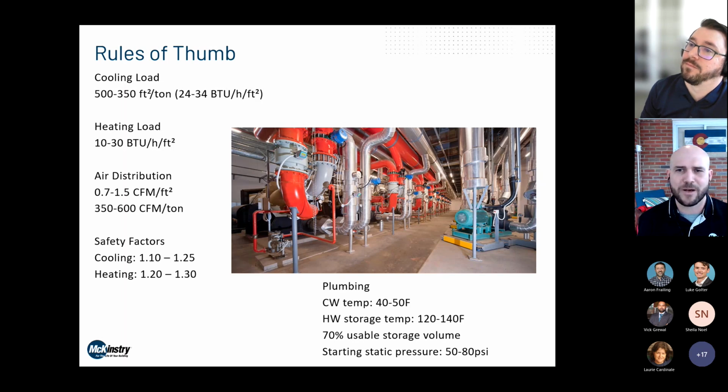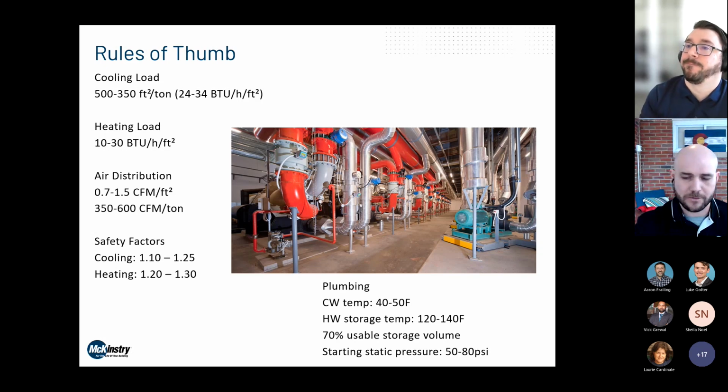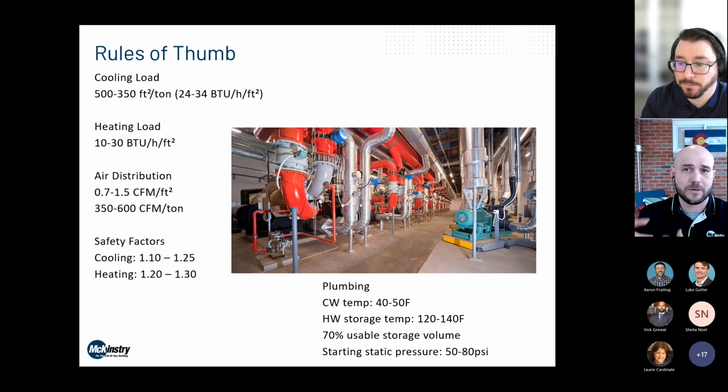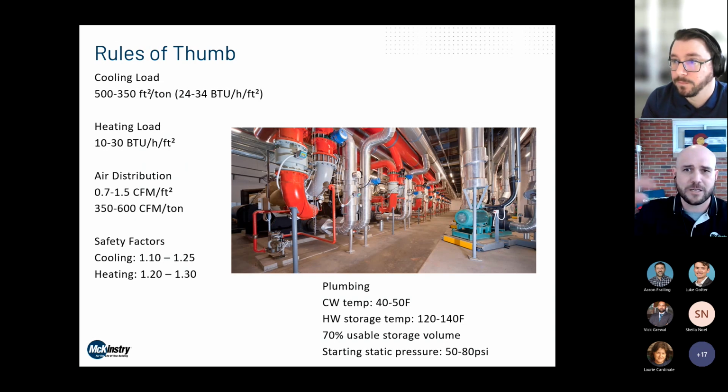It may not be final and have everything dialed in as well as they'd like it to be, but in the interest of getting that large stuff ordered to accommodate those long lead times, it would shuffle some things a little bit in terms of the sequence. Usually that stuff would all be bid together as part of the construction package, but you need to get that out the door 6 months earlier or a year earlier. That'll just happen far earlier in the process.